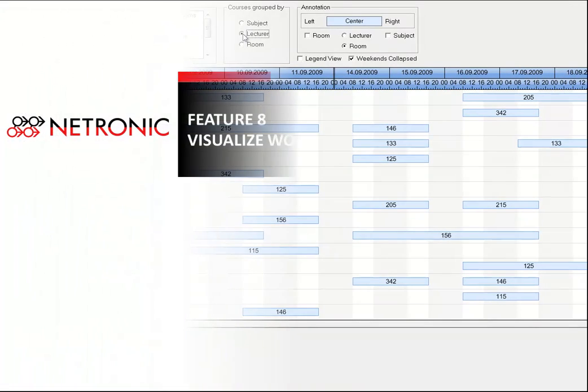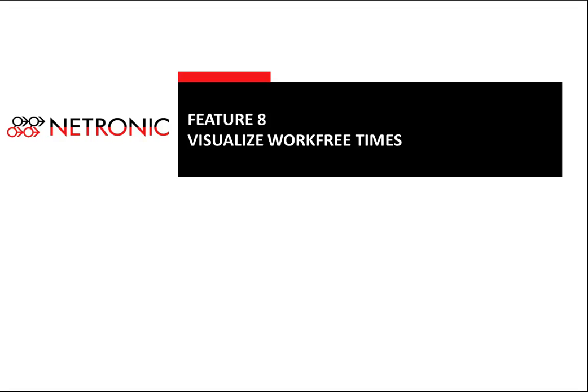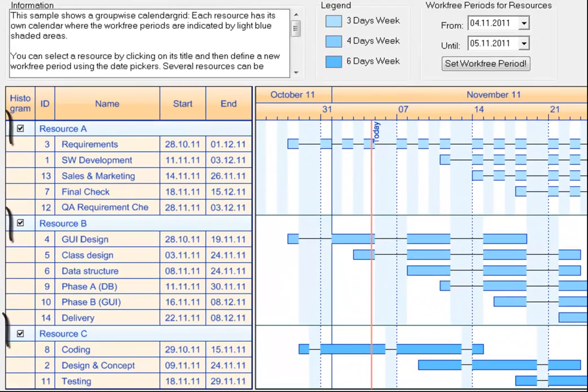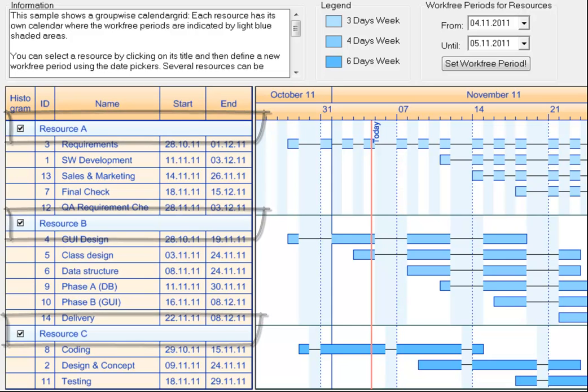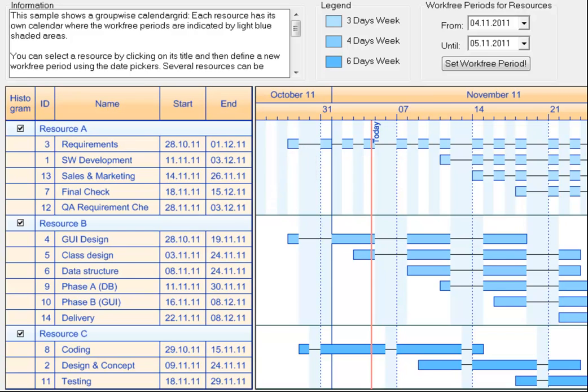A typical challenge in virtually any scheduling situation is that you need to plan with different resources which do not have the same availability. The resource or even activity-specific work-free times should be shown in the Gantt chart as well. The example here consists of three resources with the first being available three days a week, the second four days, and the third six days. Here you see that an activity is shown as a thin black line during the work-free periods.